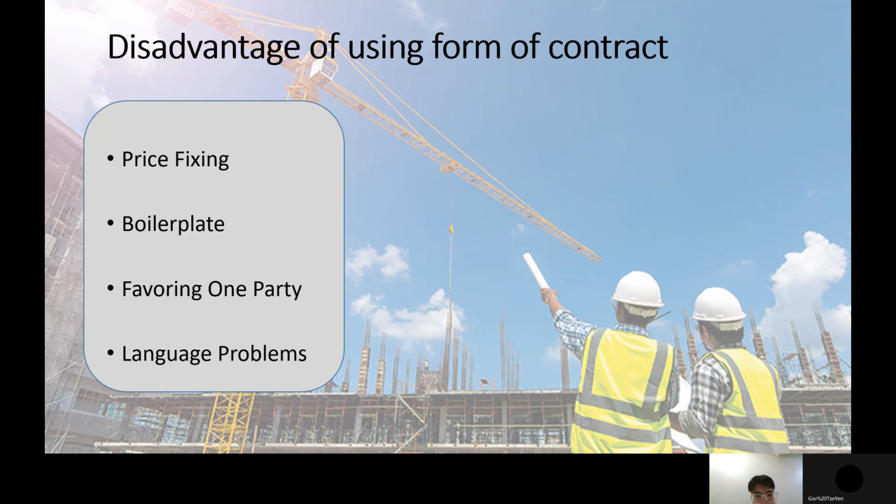The last disadvantage is language problem, which is that the word shall gives off certain connotations. When a contract says you shall do something, it establishes an obligation to perform the action. It's legally binding terminology. If a contract uses the word shall regarding something you would rather not be obligated to perform, you should get it changed to may.